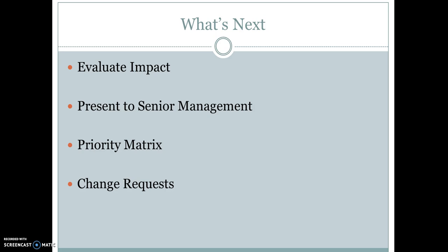Next, Lauren needs to develop a priority matrix to request senior management to clarify their priorities. By doing so, Lauren can focus on the high priority items with the time and budget currently allocated. Perhaps senior management only wants certain things to be done before the product can be introduced to the market. This approach may help Lauren determine if parts of the technology design should be outsourced to reduce the amount of time the project team has to invest in the project if it is done in-house, especially with the level of uncertainty the R&D team has expressed already.